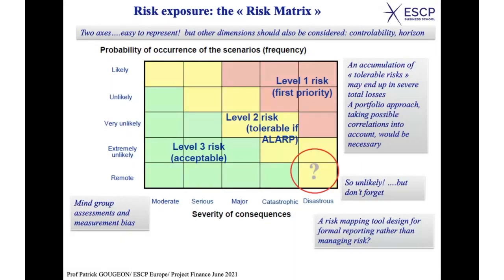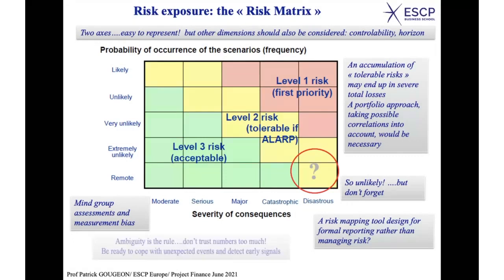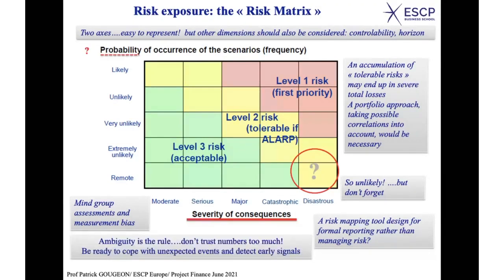And there is one consensus among risk managers, okay, that you should forget about probability. If a risk is severe, whatever the probability, anyway, you can't assess it with strong reliability, okay? The severity of consequences comes first. If consequences of a particular event are potentially very severe, well, you have to find a solution, whatever the likelihood, okay?